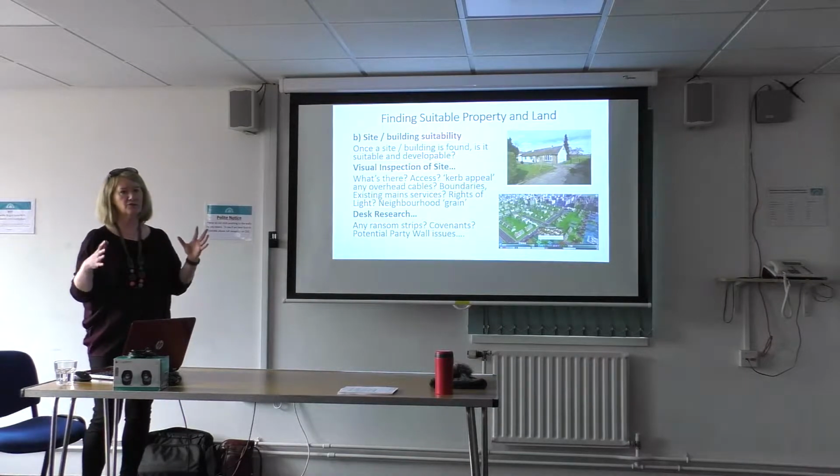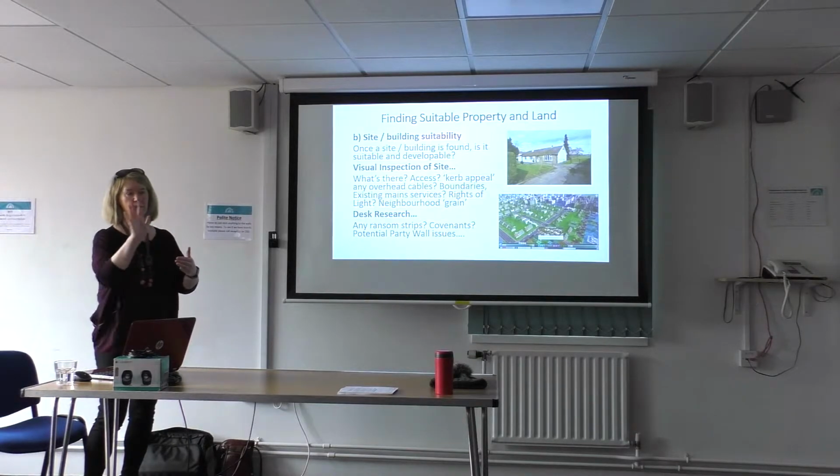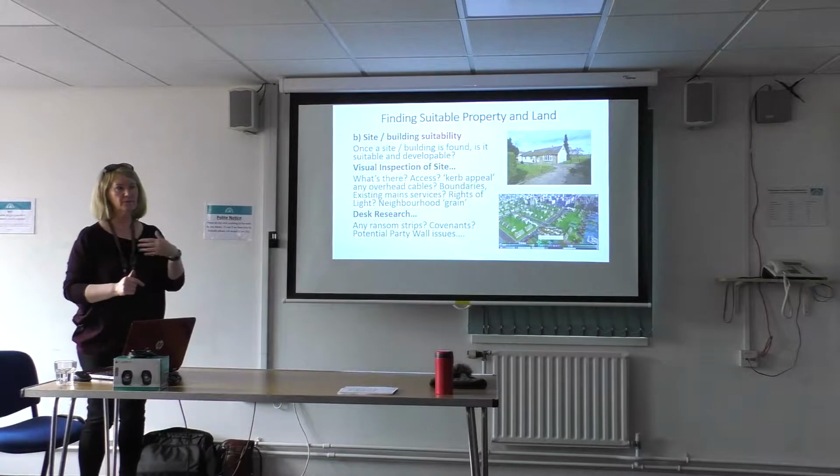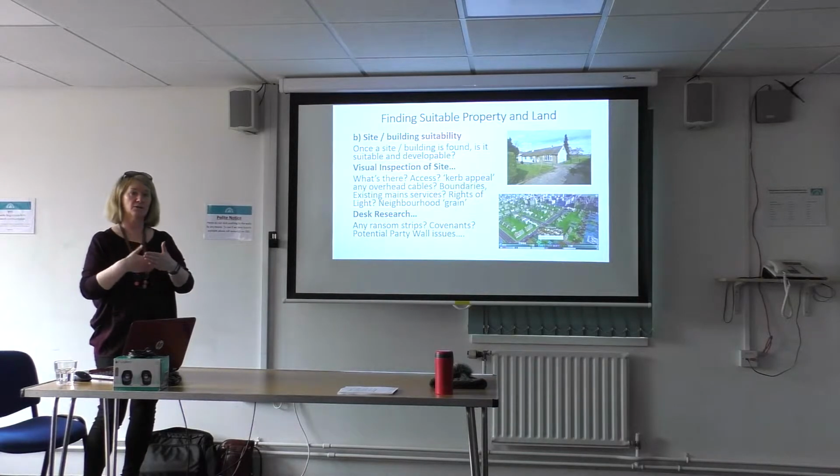Rights of light. So if you're in more of an urban situation, are people very close to the boundaries? And for instance, have they built on the boundary? If they've built right onto the boundary and there's a window there, there's a right to their light, and that's established. So you wouldn't be able to build right up to the boundary there. So you'd have to look at that.